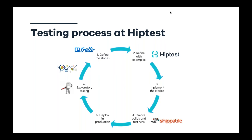Before starting implementation of a feature or user story, we have a Three Amigos session with the product owner, marketing, one developer, and one tester. We ensure a shared understanding of the feature — the business expectations and assumptions — and also the behavior. For that we use HipTest to capture the different BDD scenarios for this feature.